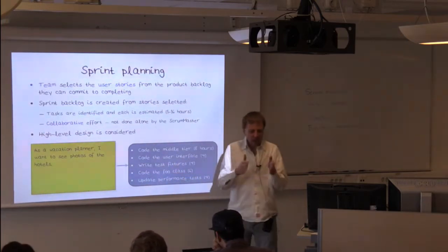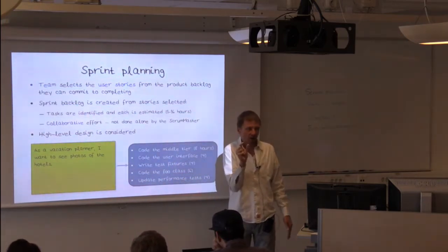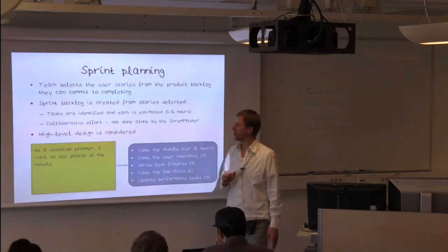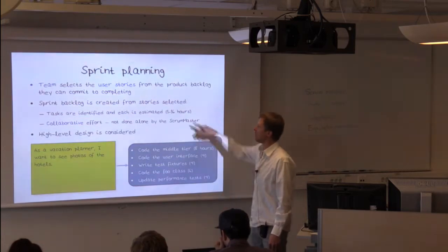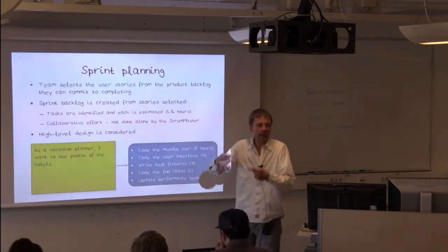Right? So small tasks. The smaller, the better. If it's too big, divide it up into two. This has to do with being able to track how things are going.